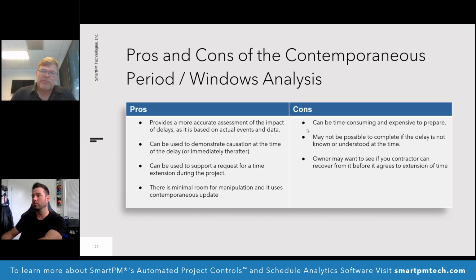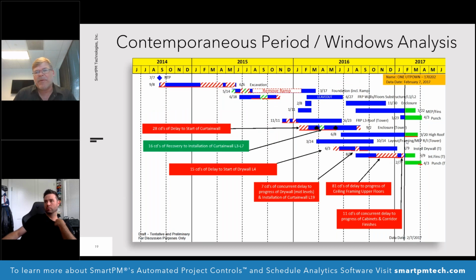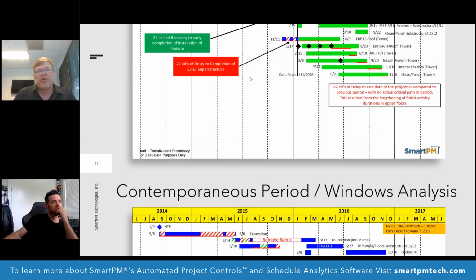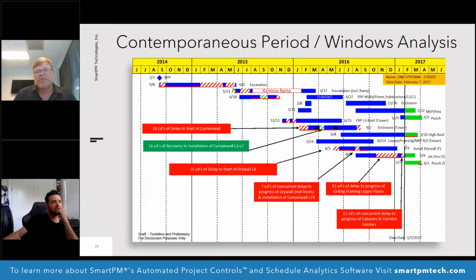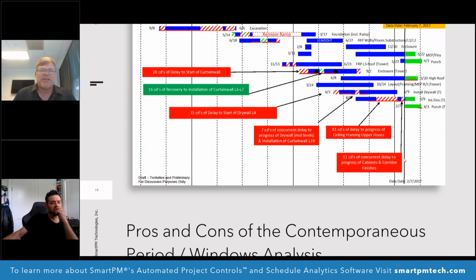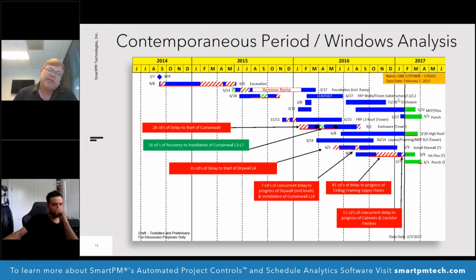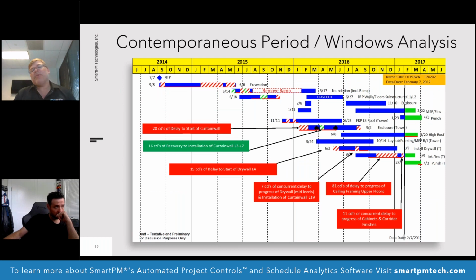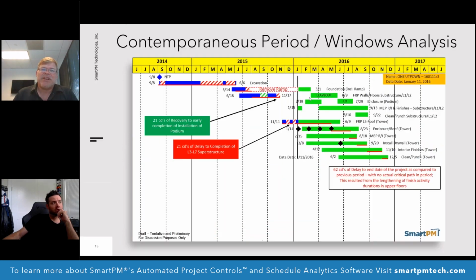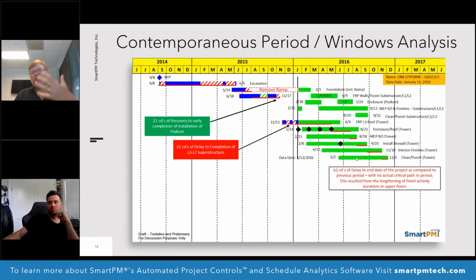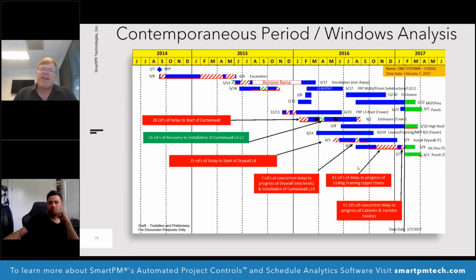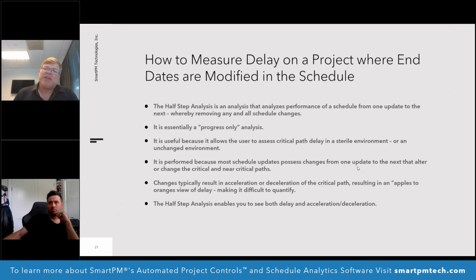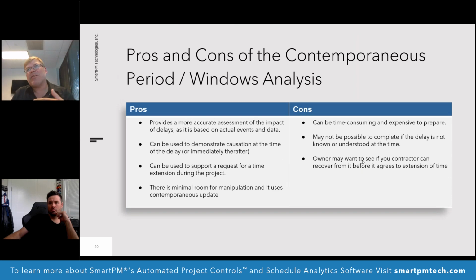It can be time consuming and expensive to prepare, especially if you're going to call a guy like me or one of my former lives to come look at the whole job up until the most current update when you're at like 95% complete. This was a real project. Doing it manually is going to take 2 months, and it's going to be arguable because of the changes that may have been happening. You can see there's this push-pull effect with that end date. But that's one thing, it can be very time consuming unless you're doing it on a regular basis or